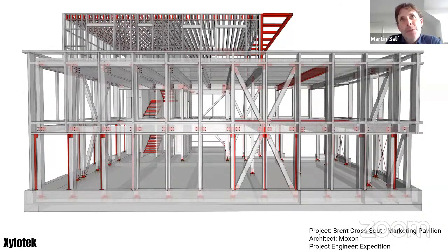On this one, we had an appointment at RIBA stage 4, so pre-tender, but we took on the detailed design of the timber frame, built a CAD work model, so a full 3D model that would be basically immediately able to go into fabrication, down to the level of every bolt, every screw modeled. So I guess there's an emergence of that kind of attitude where a timber specialist designer gets involved early to preempt the manufacture of the building.